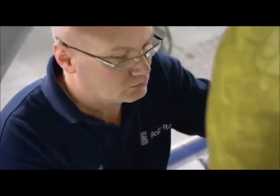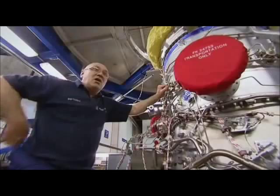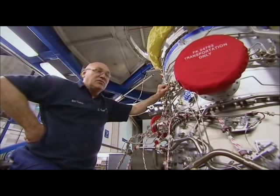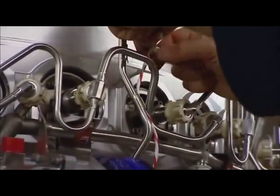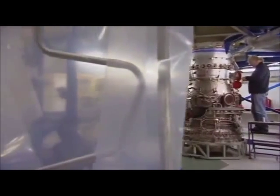Instead, they've identified parts that can be fitted ahead of schedule. It could arrive any time in the next hour, it could be in the next day, you know, we don't really know. So what we've done, we've jumped ahead and carried on building to try and get things done. As it is at the moment, we can't move it, we can't pick it up without that final module.